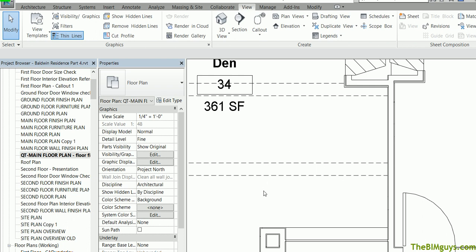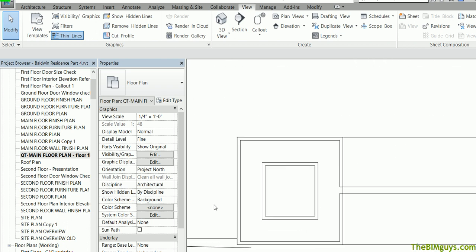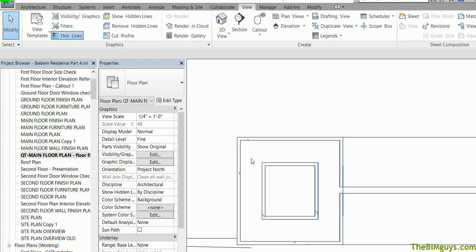So if you do have a scenario like this I want to show you. You'll notice that this wall has gyp on the outside and gyp on the inside. So this will actually give us a false reading, extra square footage of gyp that we don't need.